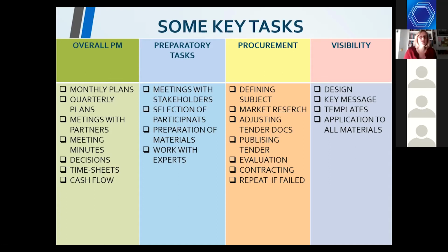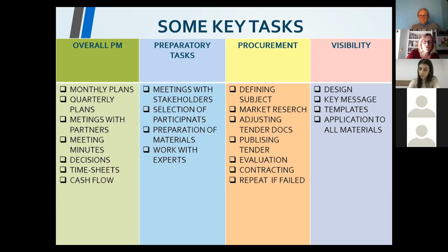Usually this is not a separate project activity described in the proposal. We need to set up some standards in our work, meaning that for each meeting we have an invitation letter, we have an agenda, we have a list of participants, and definitely we have meeting minutes. One of the very often missing documents to prove that, for example, some team member was participating or doing some work is meeting minutes from the meetings with stakeholders, partners, or regular team meetings, and so on.